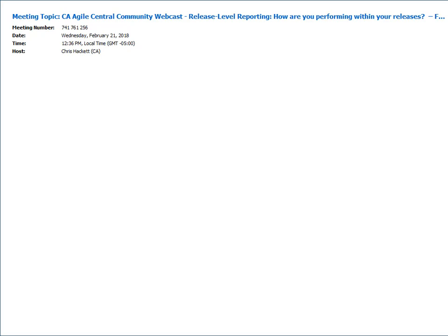And then if you look at a couple of the velocity apps, like that enhanced velocity app, you can actually set it to skip a day. Because oftentimes, as you probably know, when you come out of planning, there might be an addition, and you don't necessarily want that to be reflected, or you might kill one of the stories. You don't want that to be reflected. So you can see that in the enhanced velocity chart by saying day 0 is actually a day after the start of this iteration. But for all these other ones, it's on the day that it starts, the clock is ticking on that, yes.